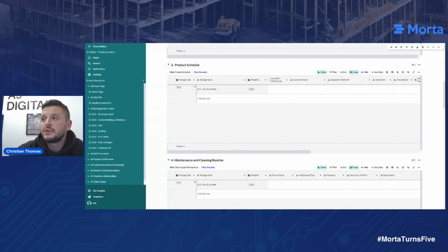So the process of getting this package or this system live would be to sit down with the client or the contractor or our client and understand what level of control we want to give the subcontractors, or what level of control we want to retain with stipulating pick lists to ensure consistency of the information that's being supplied. All of the information, when it's being populated, as standard, there's a 2-tier review workflow, whereas it's uploaded as a draft, so therefore technical information or technical data sheets which have yet to achieve the correct status of A or whatever is stipulated on the CDE can be populated in draft format,